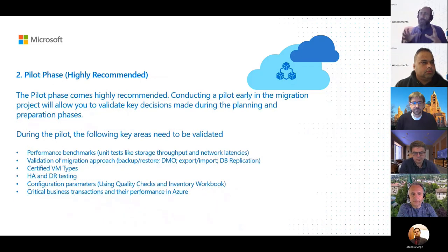Then as you have your planning and preparation done, from a Microsoft perspective, we highly, highly recommend to run a pilot. Now, this doesn't have to be a full-blown, 100% comprehensive pilot of every single system and combination there possibly is. But the key message here is that we see customers who engage in these pilots early on. They learn fast, and what they find in the pilot often informs their later design phases. It refines those designs because they might find that this storage solution doesn't quite do what I want it to do, and it doesn't quite meet my business requirements or my non-functionals. So the pilot is really, really important to learn early on and avoid known pitfalls as you go.